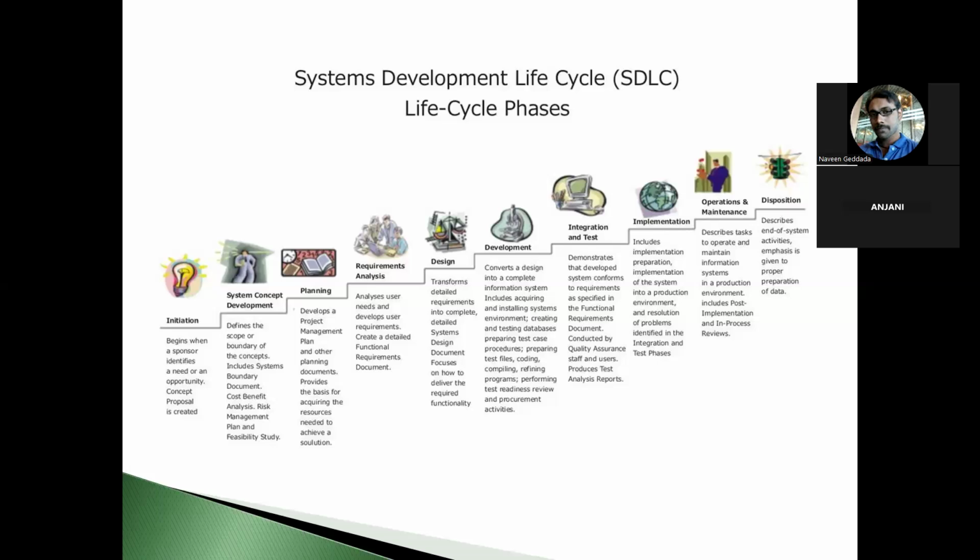We are going to explain each and every statement or sentence mentioned in the document. We need to start by explaining the purpose, and then the scope, and then give them a high level introduction, or we can say a high level design. And then you need to explain each requirement and the expected functionality.